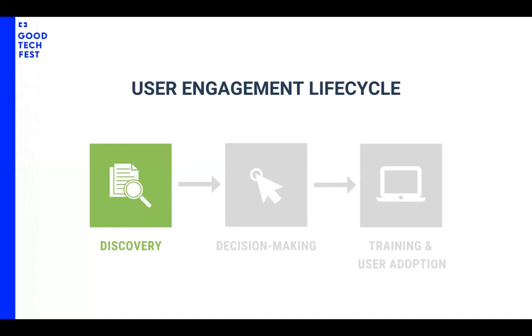RefugePoint was addressing challenges that had been identified and felt over a long time. But that said, we still did a very thorough discovery process with a consultant, that's Vera Solutions. And how we did that is we brought together representation from all teams, including our HQ. And this way we were able to identify particular needs at every level.